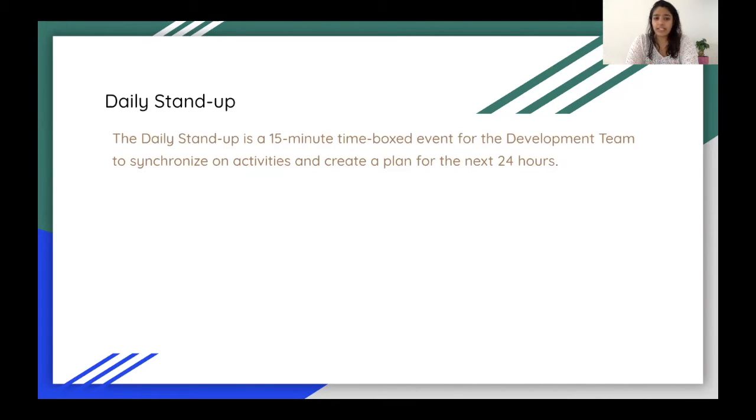This definition is quite clear. You meet daily. It is time-boxed to 15 minutes. Let me just point out here, 15 minutes is set for a Scrum team of between 8 to 9 people. So if you are lesser people, you accordingly reduce the time box.